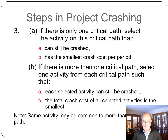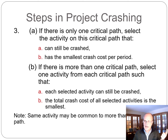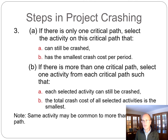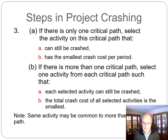If there is more than one critical path, select one activity from each critical path such that each selected activity can still be crashed and the total crash cost of all selected activities is the smallest. Note that some activities may be common to more than one critical path. Sometimes the temptation is to shorten the activity common to two critical paths because it's easiest, but if it costs more than two separate activities on individual critical paths together, that doesn't make sense. That's the key trick to watch for in a crashing question.